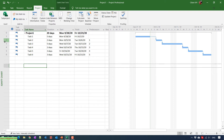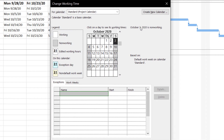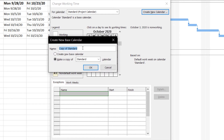Go to Change Working Time. By default it will be using the standard calendar for your project. I will create a new calendar by adding the weekend into this project — click on Create New Calendar and name this one 'Calendar with Weekend'.